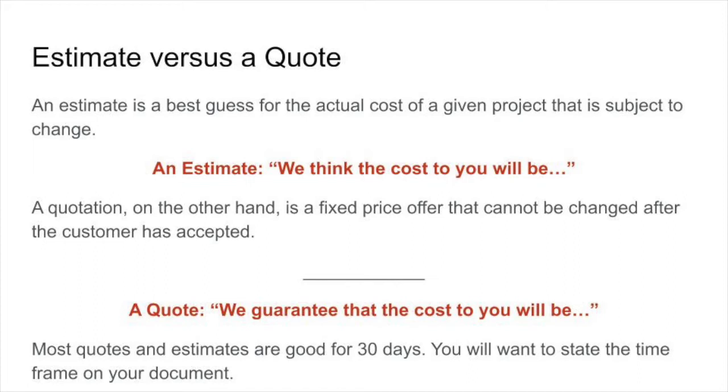Okay, but the other thing that you want to consider is that sometimes businesses, the town, or government are going to want a quote. A quote is a guaranteed price. There's a difference between an estimate, which is non-guaranteed, and a quote, which is guaranteed. So if I asked you for a quote to paint those rooms, you're going to give it a lot more consideration than an estimate. You're going to have to come to my house, size it up, and come back to me with a written amount that says $1,300.